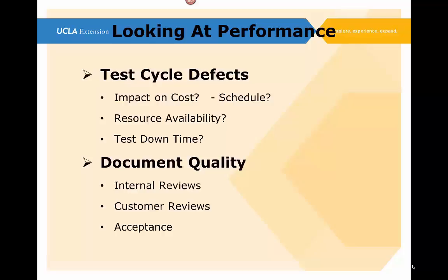And I'd have the tech writer sit right behind the designer, and the tech writer could see what was going on, and they'd take notes, and they'd have captured most of what needed to be involved in the user's manual, or the maintenance manual, the support manual, whatever it was that was required, or the testing documentation that was required as a deliverable out of the project. So it's a lot of interesting things.